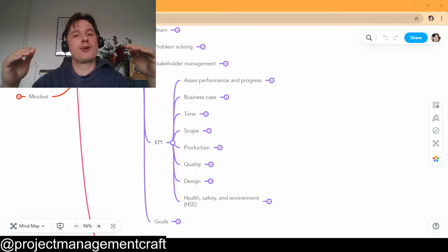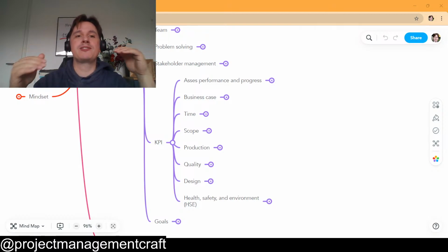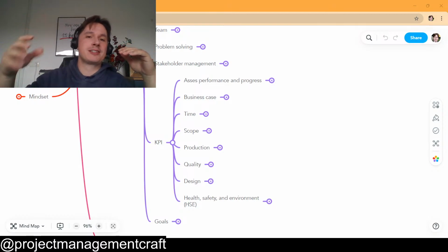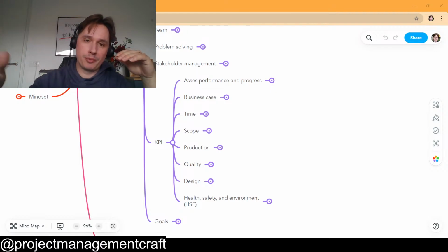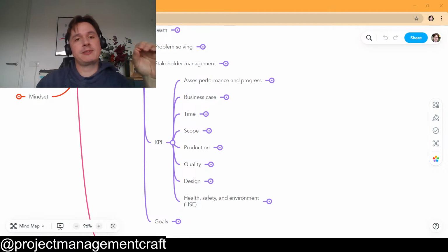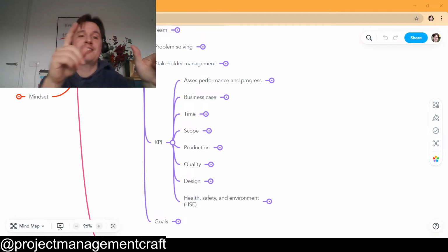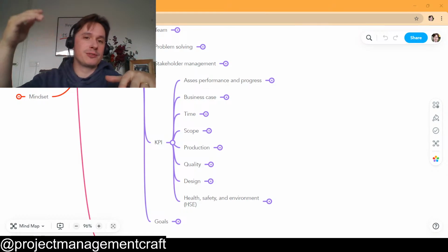Anyway, because your key performance indicator is to issue drawings, the priority is always to keep issuing drawings and not releasing drawings. So you get a big backlog of drawings that need review and need to be sent again for approval before they can be approved for release. That messes up the entire project dynamics because you are prioritizing the wrong things, because people tend to chase their key performance indicators to have them in a good way.